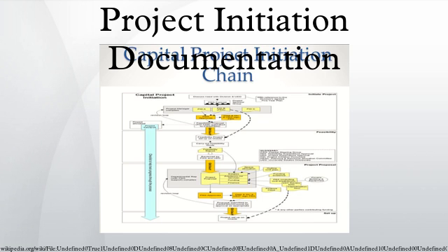Tip: initial project plan. Writing the initial plan for the PID implies adequate reconsideration of proposed dates and detailed phases accordingly. Often business stakeholders ask for the project to be delivered to impossible dates, which requires highlighting that fact. In that case most stakeholders are flexible and about to reconsider the launch date or reduce the scope. Rescheduling the launch date or reducing the scope needs to be supported with justifications, on which stakeholders make a decision of delaying the launch date. The sooner the worker starts building that sort of relationship with stakeholders, the easier it will be later on when more pressing concerns regarding scope are raised.